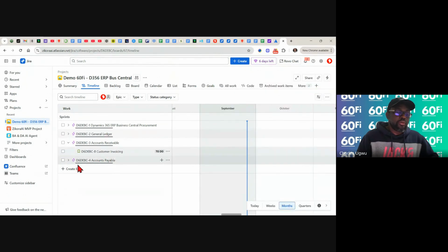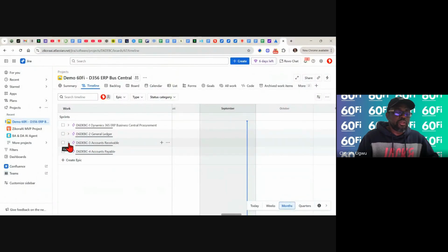Mind you, you are not the one giving the story points as a business analyst. Only if you, the business analyst, are equally a developer that is going to work on this work item, so you should have a good idea of the effort. Outside that, it is the developer that is supposed to give the estimate. So we only have one item here. Close it. Open this one.